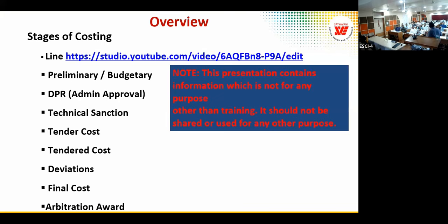So that's why what they did was 30 marks they have given for presentation. It should be a committee of 6-8 experts actually. But there are only 2 people in the technical committee. 2 people have given 30 marks to the higher bidder and 10 marks to the other bidder. So it's done. So QCBS also, there should not be any evaluation by objective method. It should be subjective method.